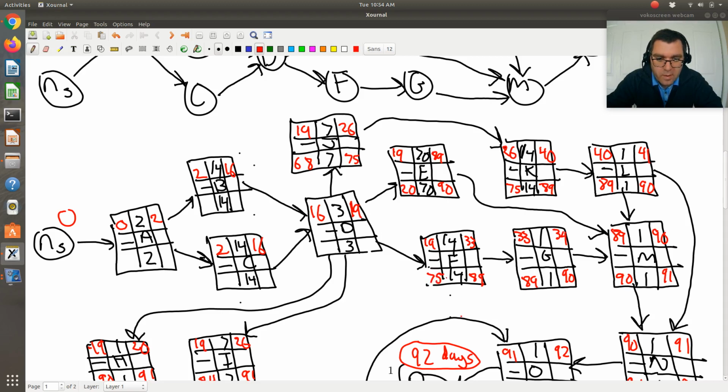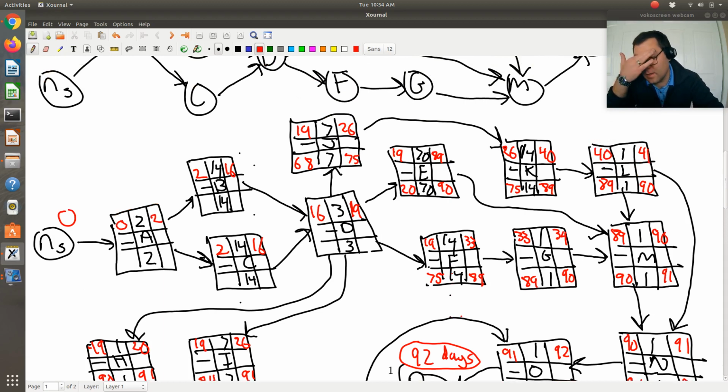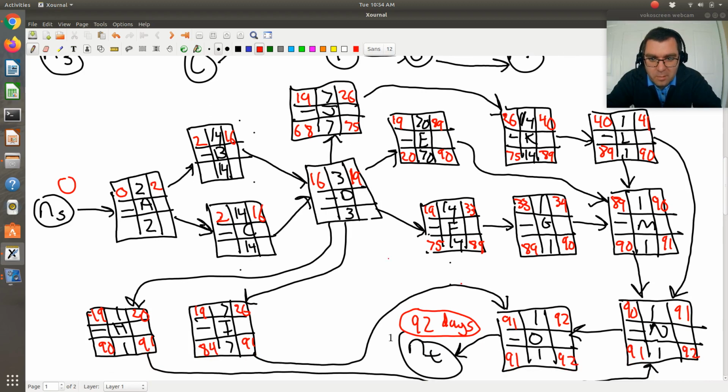Yeah, 75. Okay. All right. Now D is going to be our big holdup because D needs to be completed before J, E, F, I, or H can begin. So what I'm looking at is the smallest starting time. Okay, so I'm looking at the smallest or the minimum of the latest possible starting time.